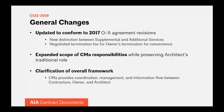Supplemental services might include things like the CMA providing measured drawings of an existing building, commissioning services, or assistance with FF&E. Additional services are the services identified later in the project — such as revisions due to late changes in building codes, attendance at public hearings, or preparation and attendance at a dispute resolution proceeding. Termination for convenience now includes a negotiated termination fee at the time of the original agreement, instead of basing compensation on the hard-to-prove anticipated profit model used in prior versions. Our liaisons also told us the past agreements often lacked strong direction and clarity of the CMA's roles and responsibilities.